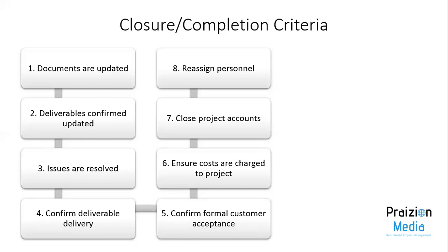Some of these individuals could also be involved in documentation, final reporting, and dealing with excess material. So when you get questions, proceed with care. Ensure that if those people are needed for closing out certain aspects of the project, don't release them immediately.